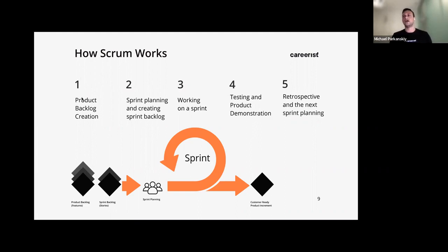And that's what scope is. You don't have the amount of manpower to be able to get to all of the things on the backlog. So the backlog usually has a bunch of tickets that add up, and then it's organized based on priority, how important it is for the team to fix or for the customer to get. At the beginning of each sprint, you get together with your team and start picking things out from there. It's like, okay, on this sprint we're going to work on this ticket, and we're going to try to fix this bug here. And you're going to put it into a sprint.